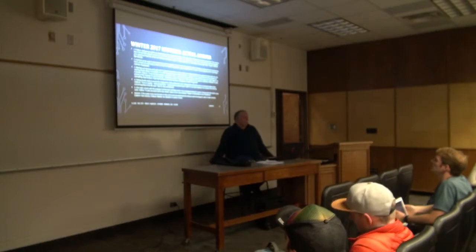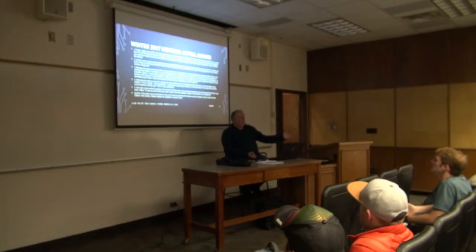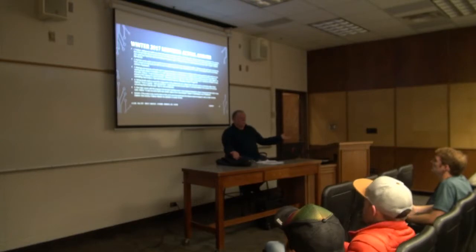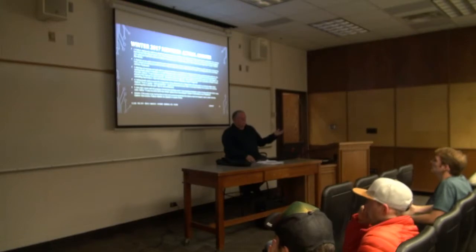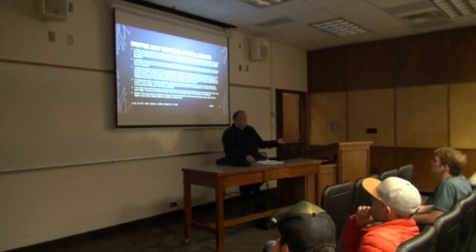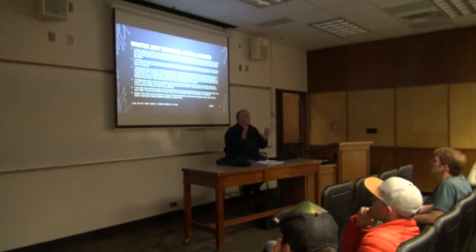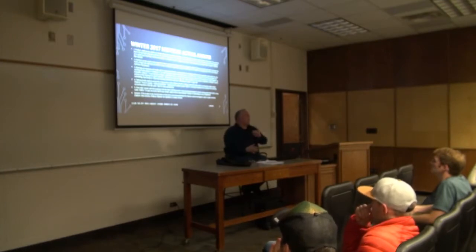He basically first cites Brooks, and he explains that adding staff to a late project makes it later. Citation: adding manpower to a late project makes it later. Chapter 2, mythical commandment 2, overtime can be useful in short sprints, but over a long period of time will not help. Has a quote, chapter 3, subheading, there ain't much such thing as overtime, Peopleware. So I know where he's quoting from. He actually cites some text in there, which is a nice anchor. It doesn't have to be extensive, enough that I know where you went to in that source to quote from.